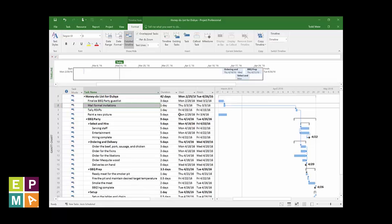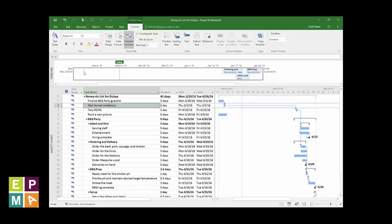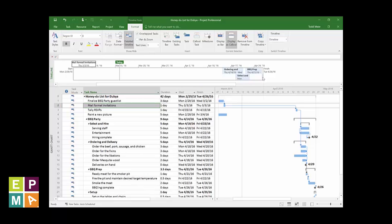Now, these tasks are added to my timeline. But notice how my first ones leave a little to be desired from a visuality standpoint. Can't even tell what it is, right? Let me click on it. Now, in the Current Selection section of the ribbon, click on Display as Callout. Presto Mundo. Now we can see it. I'll do the same to the last one, Set Up.